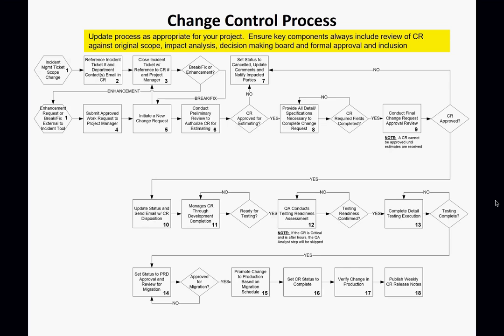Log the change request. Now you're not expecting the project manager and everybody to be put together, but sometimes everyone comes together on one particular change. If there's a change request, I can call a meeting to say there's a change request review meeting today. As a PMO, I will always advise that once in two weeks, you organize a change request review meeting.